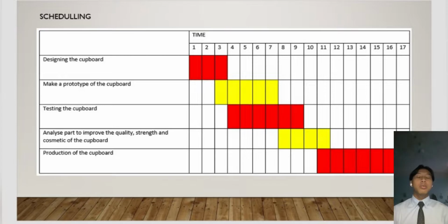So today I will start my part with project scheduling. Project scheduling involves sequencing and allotting time to all project activities. By that, our group will use a Gantt chart, to make sure the activities are planned. Second, the order of performance is documented. Third, activity time estimates are recorded. And lastly, the overall project time is developed.